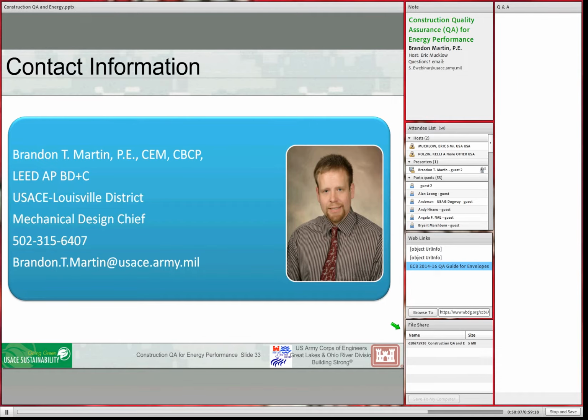If additional commissioning is required, a higher level of commissioning, do we want a third party, those kinds of things, those would need to come from, well, first, could come from construction funds, but we need customer concurrence to use those funds for that purpose.